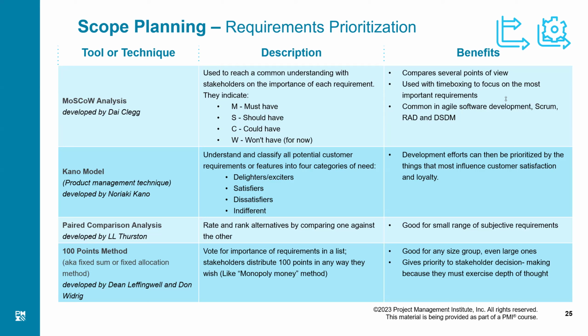So when we are analyzing the requirements, we say that we want to prioritize which are the most important requirements. So we may put them into 4 categories. The highest priority are those which are must-haves. These are the requirements we can't miss. They are the most important requirements. That is the highest priority requirement.